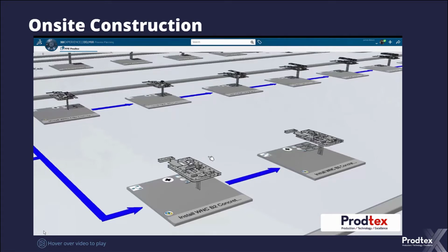And then from that, I'm then creating a process plan where I'm actually going to define what floor comes when. So if I'm going to build the first 3 floors and then I'm going to kick off my MEP teams, or maybe it's down to the specifics of I'm going to do this wall, then this wall, then this wall. So that sort of level.